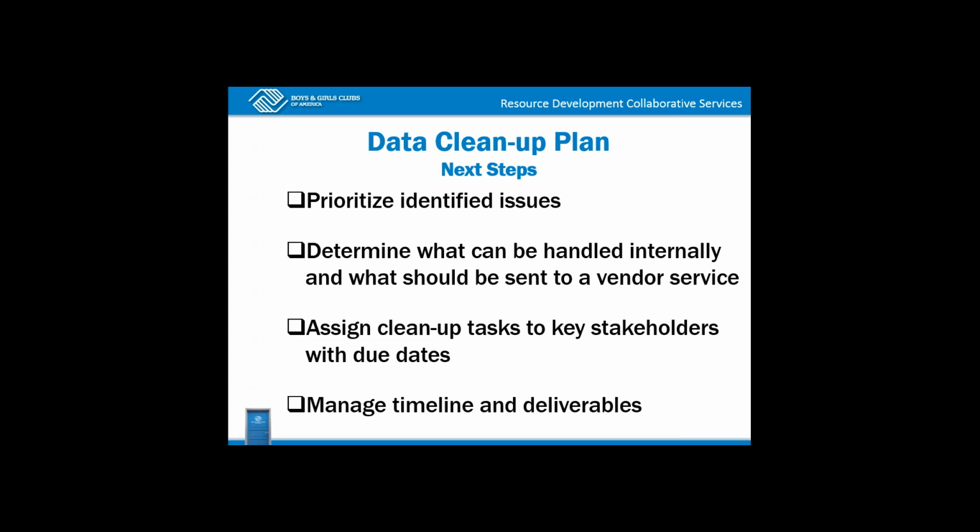And the next step in that would be to prioritize your identified issues, determine what can be handled internally in terms of cleanup or what might need to be sent to a vendor service. It's really important to assign cleanup tasks to key stakeholders with due dates and manage the timeline and deliverables. If you're not project managing this and holding each other accountable for your committed due dates, then the database will never get clean. So it's really important, whatever issues you've identified, the things you choose to do internally, to hold each other accountable and assign those dates and timelines and deliverables.